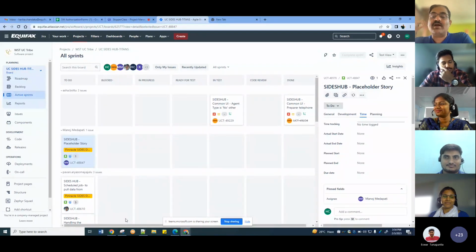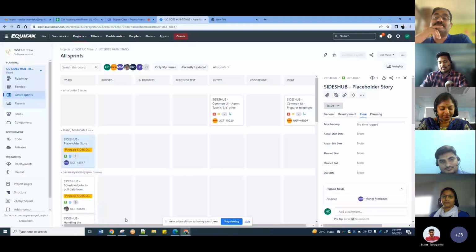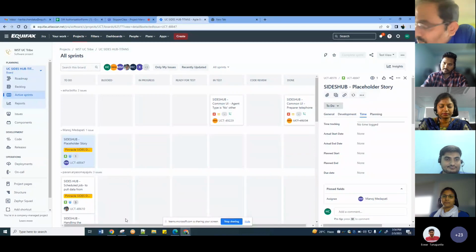But, you know, developers have problems with that. So what is due date? Your development due date or total story completion due date? Only development due date, so that we'll be tracking with the QE team, whether they'll be able to get all the inputs and, you know, dev team is handing over the story to QE team by that particular date.